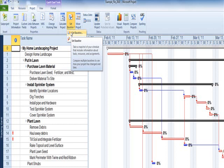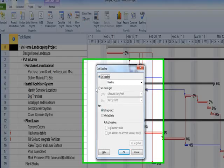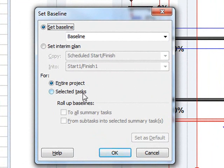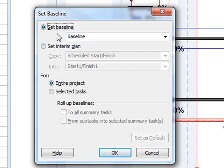Choosing Set Baseline from the drop-down list brings up the Set Baseline dialog and the Baseline options. It's here that a baseline can be set for the entire project, for individual and groups of tasks, and for an interim plan before implementing that plan. I'm going to set the baseline for the entire project.